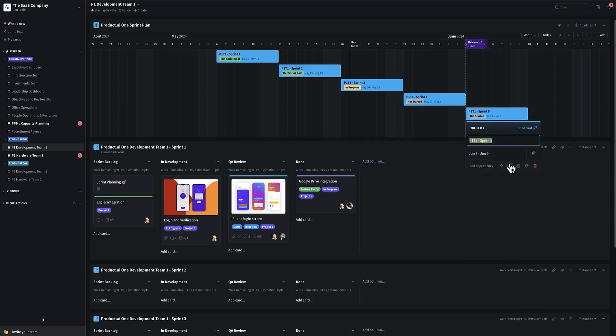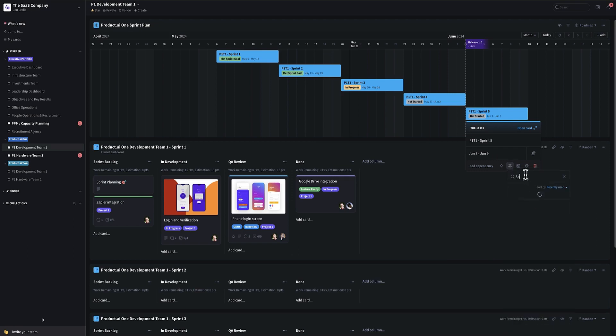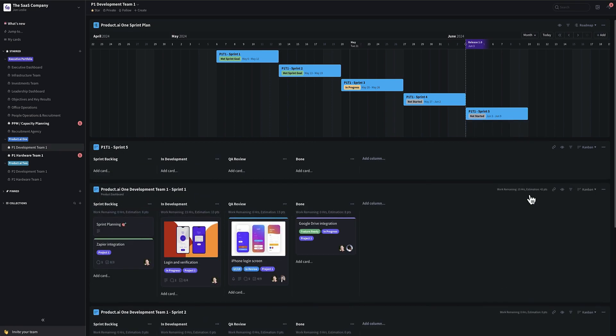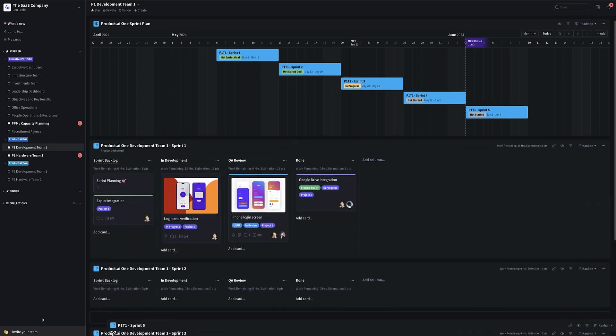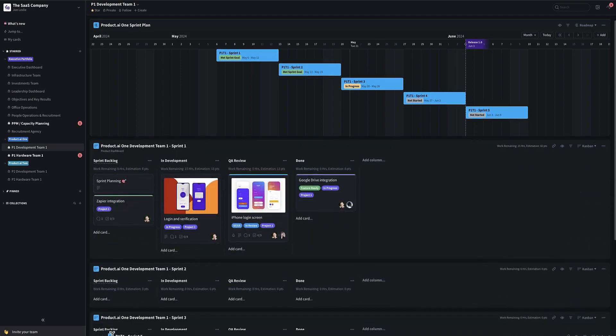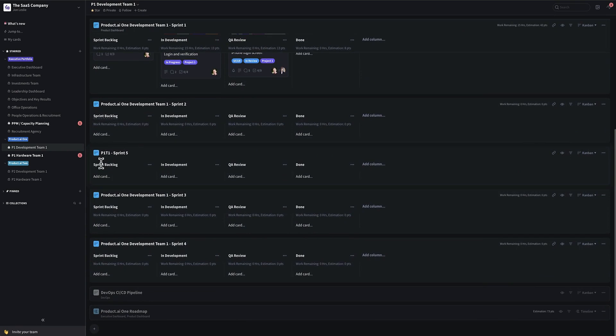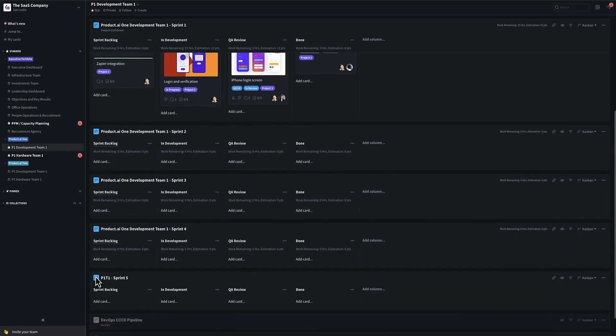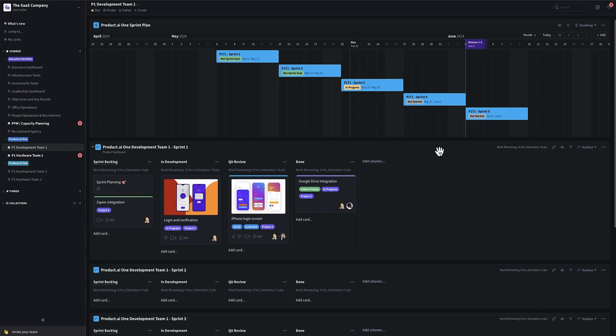Then you have that represented on the timeline, but to create it as an actual sprint, you just click here. Again, say break down to board. And select the sprint template that you created from an existing sprint. And there you have it. So now we have sprint five, and we can put this down where it belongs. Underneath maybe sprint four like this.